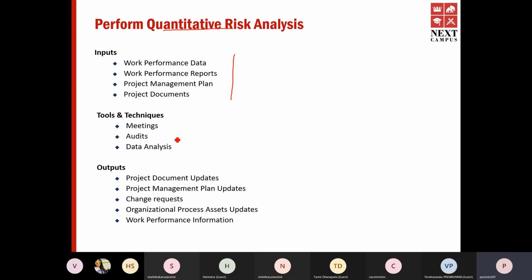With that, we went to the customer, we explained the situation, we told what we are going to do to rectify the issue, we told the impact he would have in terms of the project timeline. So he was not very happy about the timeline delay, but we negotiated, we made sure he gets certain things up front versus certain things at a later stage in a phase-wise approach. So we agreed on that.